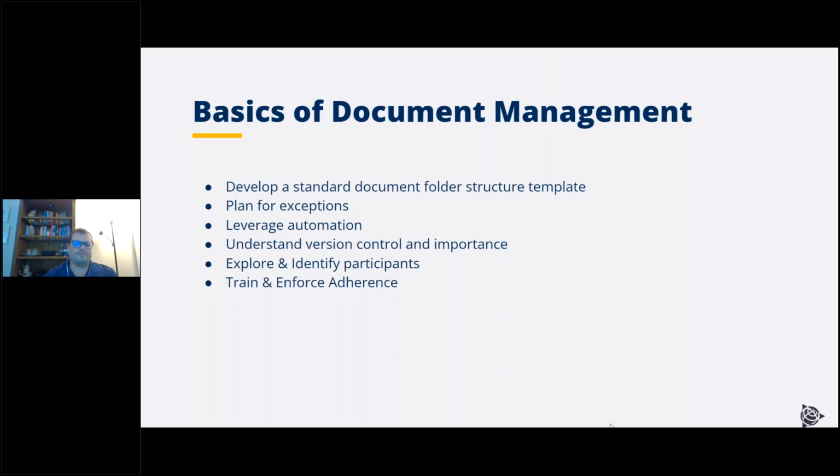Another pain. We don't have a full structure that's locked, but we do need some flexibility. We're doing a project that's going to include multiple different parcels of land, and we need to track all the acquisitions for those specific parcels. We need to have it separated and not just in one giant folder. That doesn't make sense. Okay, we can put into the template a way for somebody, in a specifically limited role, to create additional folders for those edge cases, with a preset folder already designed that they can follow, so the naming convention continues.